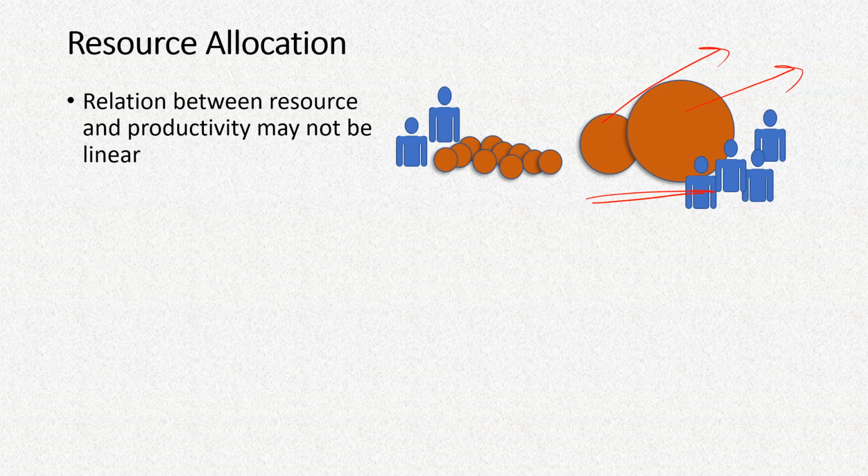So it is required to remember that sometimes for some activities a minimum number of resource deployment is always necessary. Some works cannot be done by, suppose, 2 people; 4 people are always necessary, and so on.